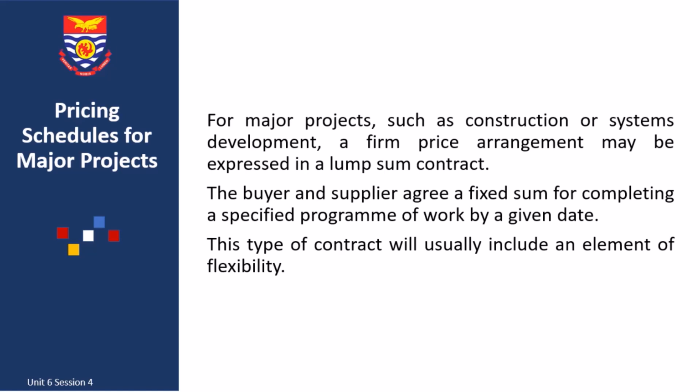Now, if you think you will not be able to forecast price accurately, you can't determine future fluctuations correctly, you're not able to know what will happen in your market in the near future, or if the organization is unable to draw up a detailed specification to base the contract and pricing schedule on, the organization may agree a schedule of rates or charges. For example, by paying per hour worked or per volume of materials used associated with aspects of the anticipated work. Payment is then made against actual quantities, applying the agreed rate.